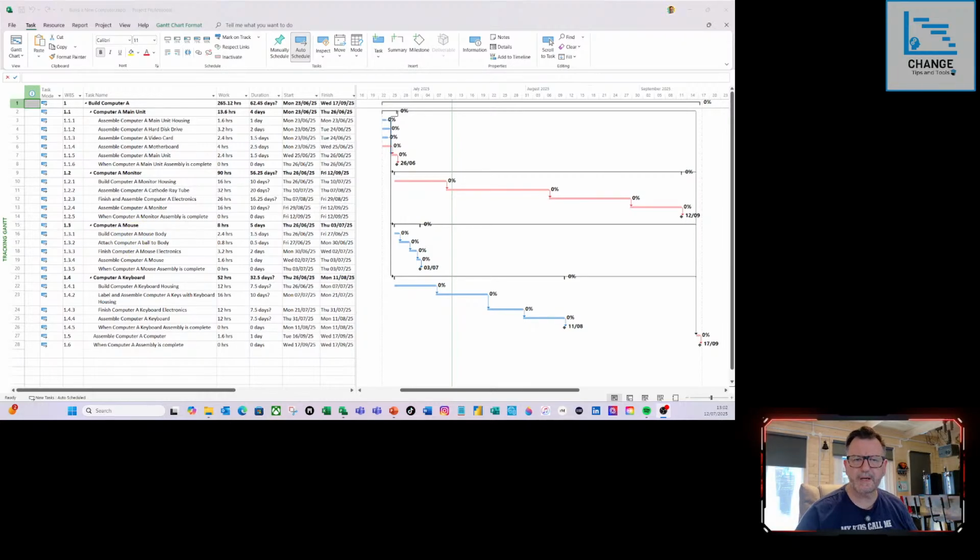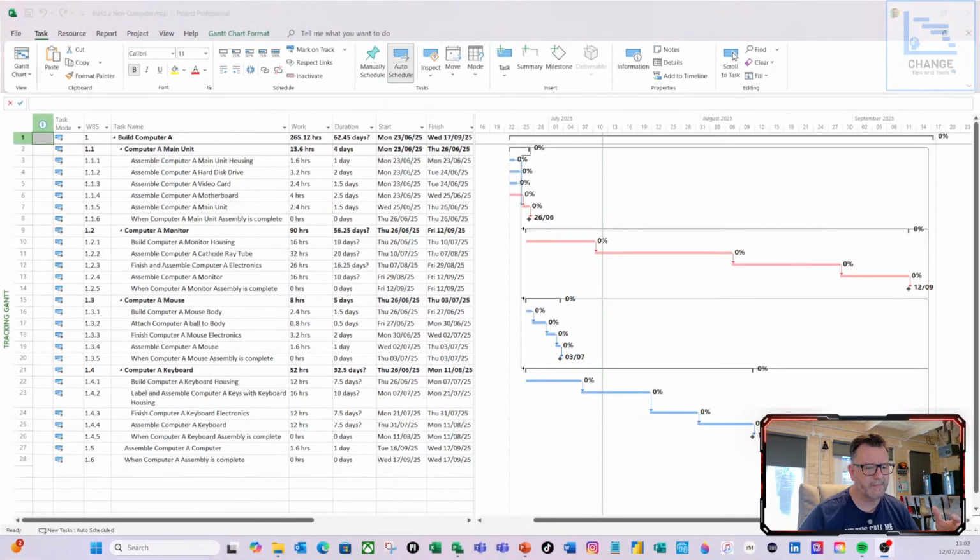It always shocks me when I see people who fundamentally don't name those tasks properly within their project plan. They don't realize that this thing has got to be aggregated and be meaningful at a program level. So it's always good practice to give your tasks the appropriate naming conventions. So here I've put Build Computer Aid because this is our computer aid build project, and I've named all the tasks accordingly. So that's the first thing.